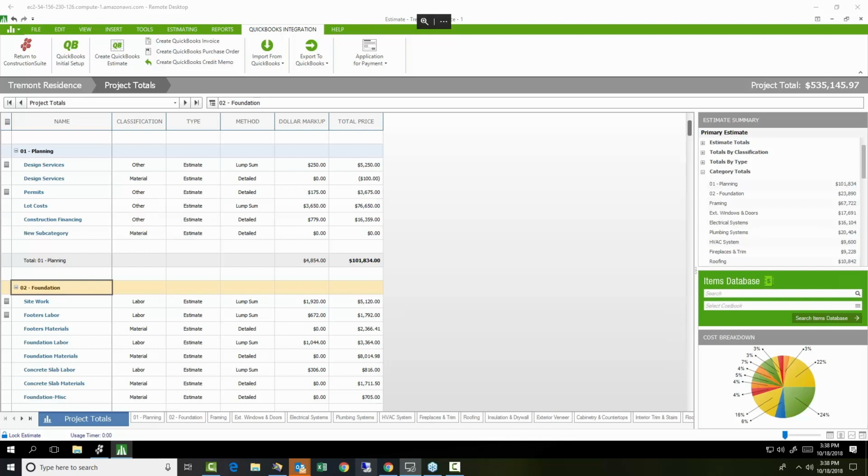So following along the logical order of operations here, it makes a lot of sense to just add in perhaps a section at the end of the estimate, add in another category, and make sure that it fits in with the alphanumeric numbering structure here, and use that section to build out your change orders. There tends to be a lot of applications in here.